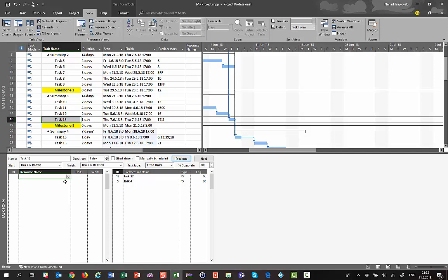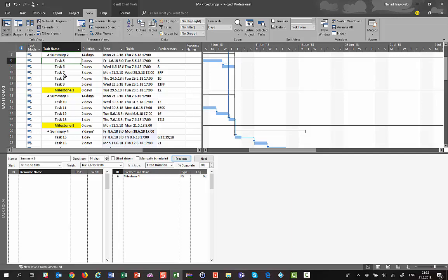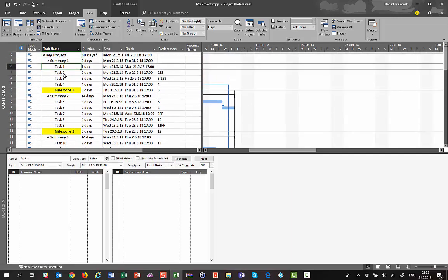Let me show you. I can say, for example, let's go from the very beginning, that for task 1 I need, let's say, Anita, and she will work only 50%. Since this task is the first task, I don't need any predecessor. I will hit OK, and I will have 4 hours.